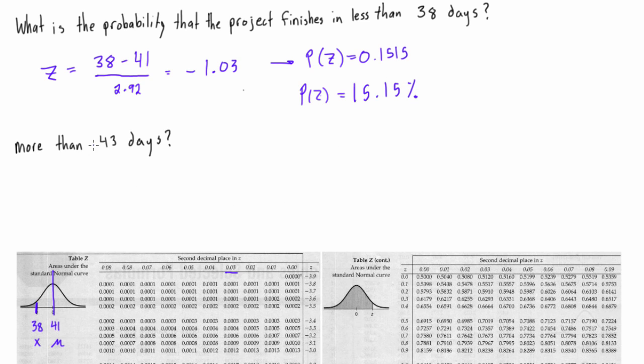Now let's look at the other example, where we're going to be more than 43 days. We will change this slightly, so our z-score now will be z is equal to 43, 43 minus 41, over our standard deviation, which was 2.92. If you punch that in your calculator, we will be getting a value of 0.6849. Let's round that to 0.68.